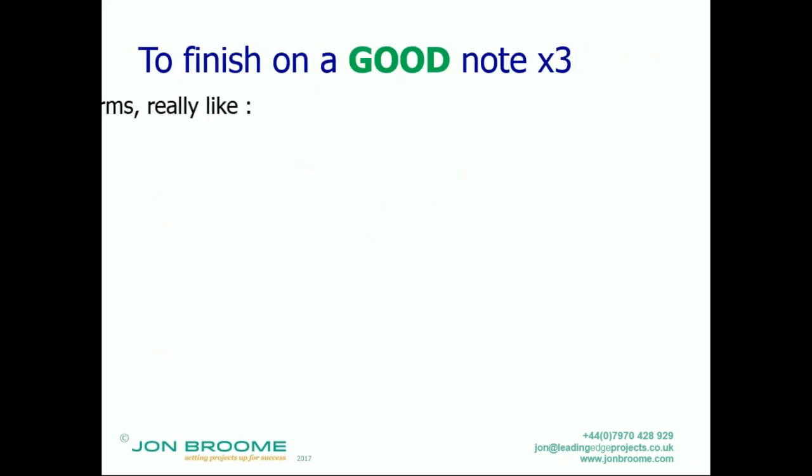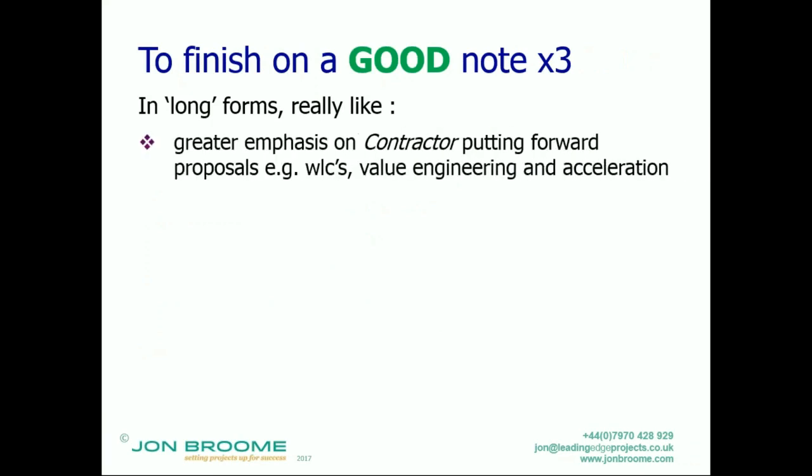To finish on a good note, three good things. In the long forms, I really like a greater emphasis on the contractor putting forward proposals. So rather than the project manager saying, contractor, I want you to put forward a proposal, the contractor off their own back can put forward proposals for whole life costs, value engineering, so savings on capital costs, and acceleration, which in NEC speak means bringing forward the contractual completion date.